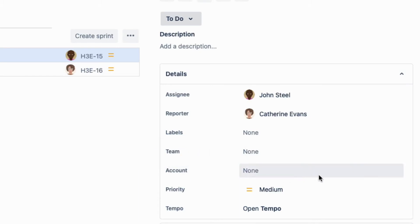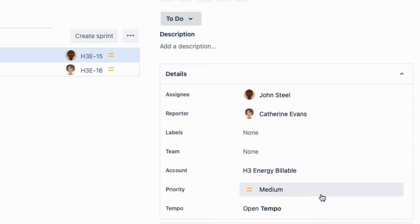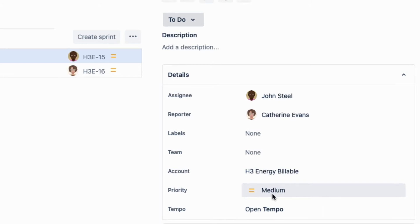This isn't a new issue, so the default account isn't set for me, but I can simply select H3 Energy billable from the dropdown. Note that only accounts that have been linked to this project are listed here. Now, all the time that's logged to this issue will be related to this account.